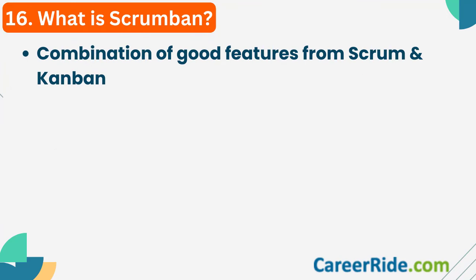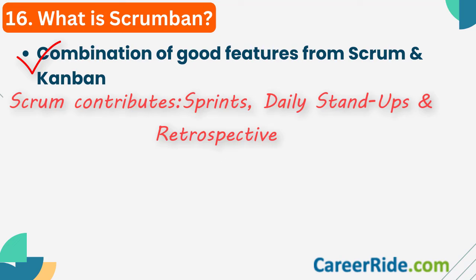Question number 16: what is Scrumban? Scrumban is a hybrid project management framework combining good features from both Scrum and Kanban. Scrum contributes three important elements: sprints, daily stand-ups, and retrospectives. Kanban's contribution includes workflow visualization, Kanban boards, cards, work-in-progress limits, the pull system, and the continuous flow of work.